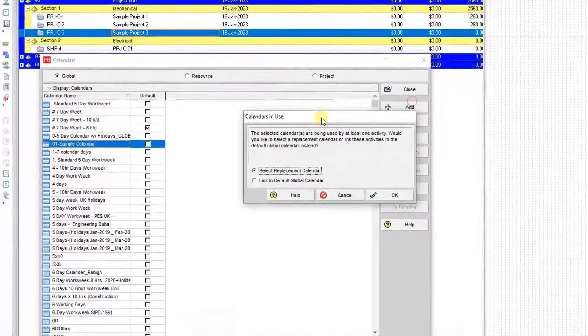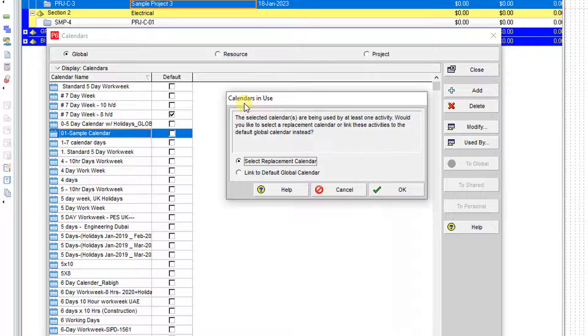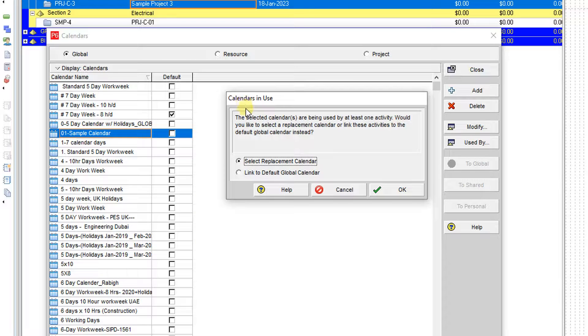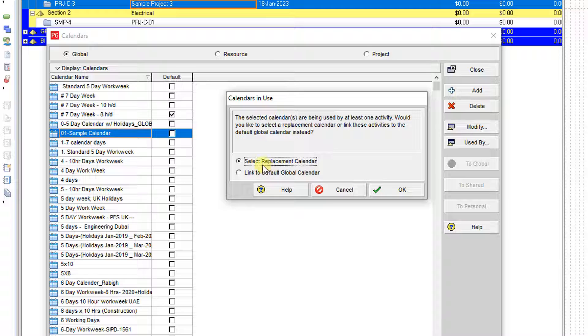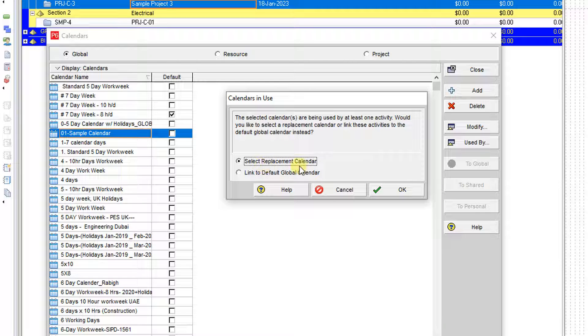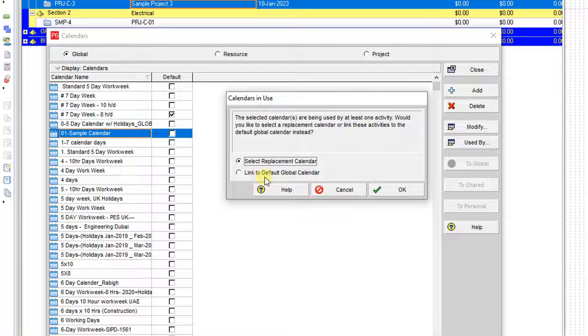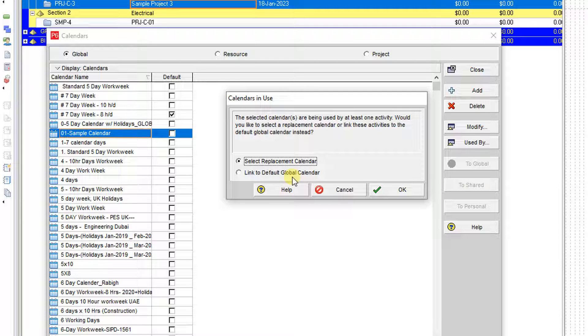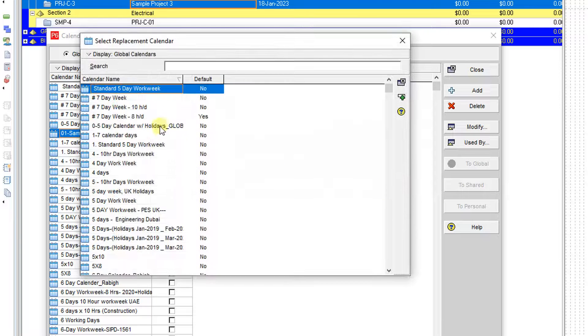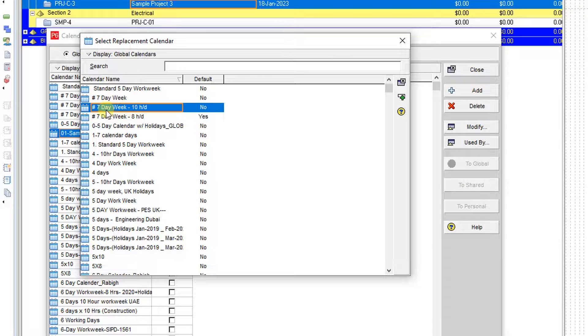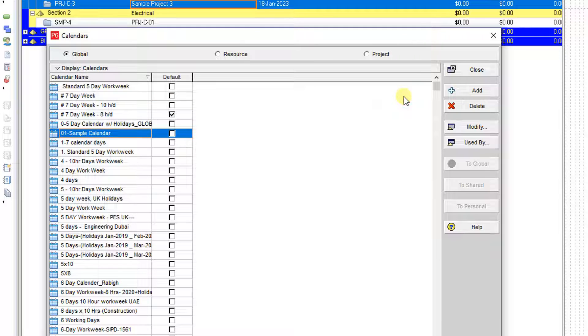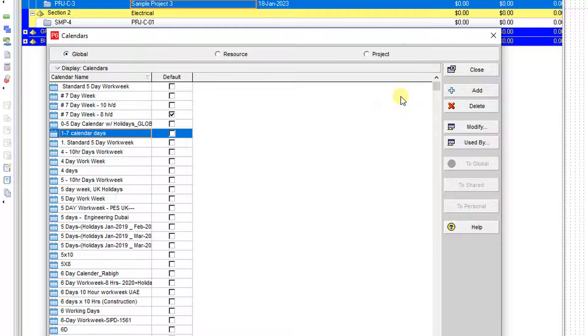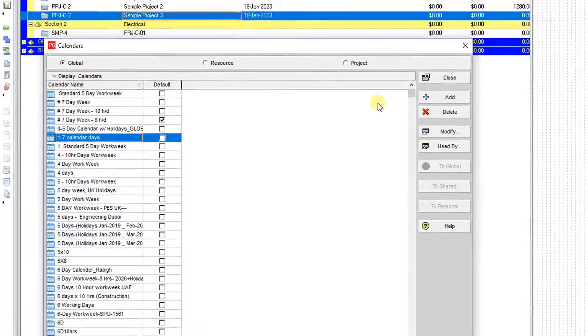The result is different because now the software told me I can delete it, but I should select the replacement or I should link it to the default global calendar. I want to replace it with the seven days week with 10 hours per day. That's all you need—it's removed from my database.